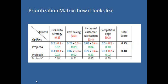What does this mean practically? By doing these calculations, we have figured out which project has the highest impact collectively on all criteria items, taking into consideration the importance of criteria items. In this example, even if project B is more linked to strategy than project A, it is not a better option because linkage to strategy has the lowest importance relative to other criteria items.